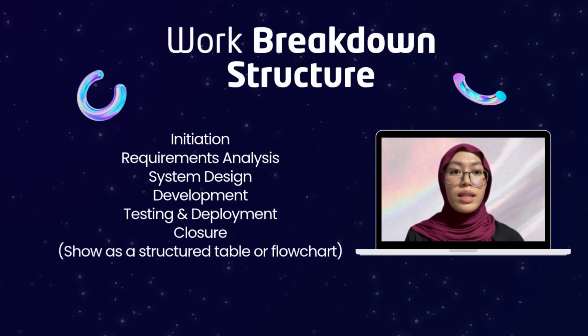Next is requirement analysis. Here, we gather input from lecturers, administrative staff, and students to understand their needs. We document both functional requirements, like attendance tracking, and non-functional ones, such as system reliability and ease of use. In the design phase, we translate those requirements into a technical blueprint. This includes the system architecture, database schema, and user interface wireframes. We also validate the design with stakeholders to ensure alignment.